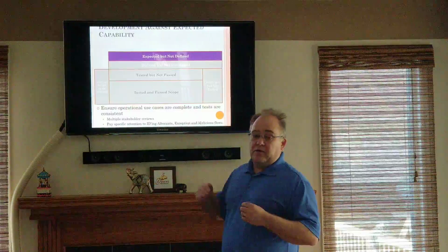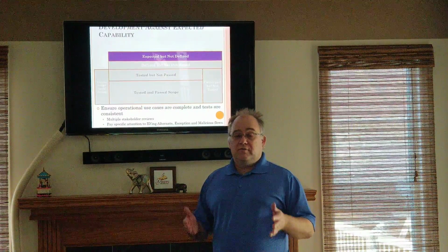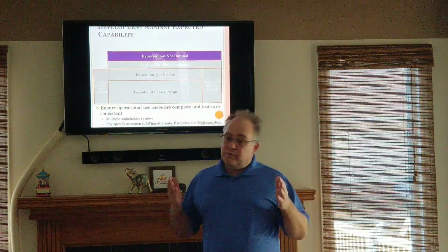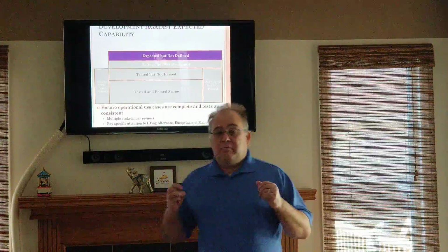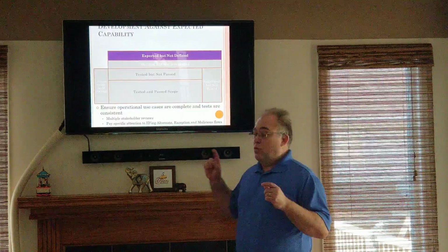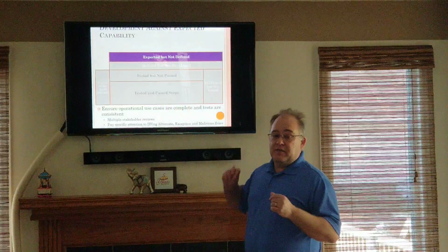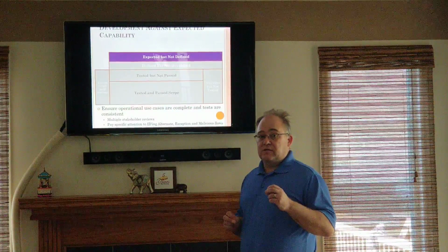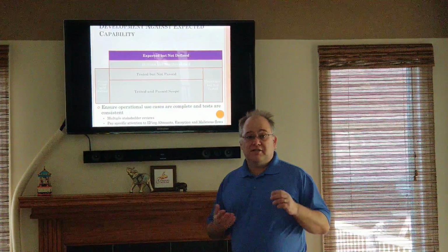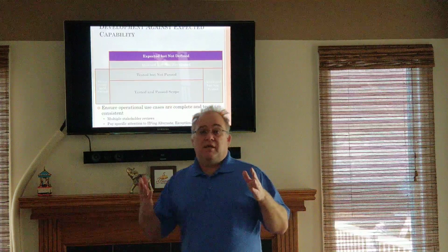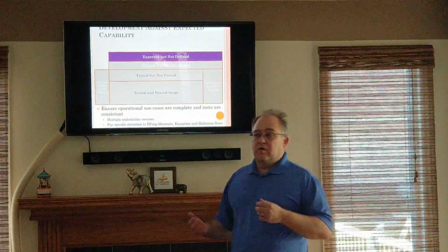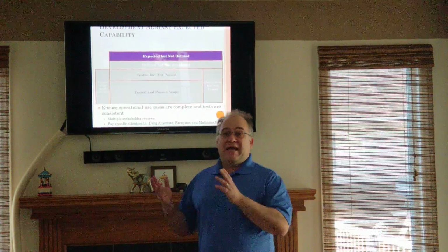The main failure of the Phoenix program, whenever you actually look through, they call it out as project management. There were certainly some project management failures, but the main failure was systems engineering. And one of the root causes was absolutely their inattention to use cases, operational use cases. They did not pay attention to the edge case scenarios of where somebody has gone on maternity leave, or somebody has been promoted into an acting role.